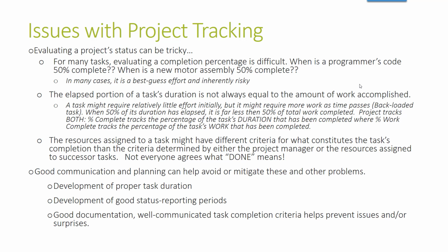The elapsed portion of a task's duration is not always equal to the amount of work accomplished. This is a really important one. A task might require relatively little effort initially, but might require more work as time passes. That's called a backloaded task. So when 50% of its duration has elapsed, far less than 50% of the total work may be completed, right?